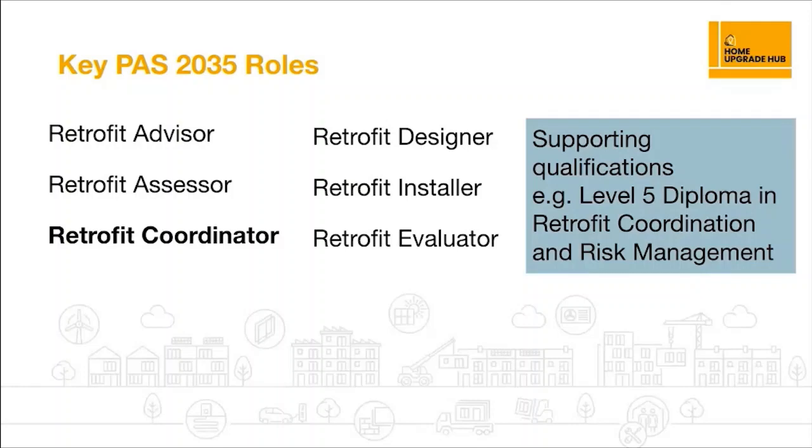And traditional building we might have in our minds as quite a historic property, but actually a traditional building could just purely be a pre-World War II solid wall home. So make sure that you're building those requirements into your procurement processes. And your retrofit designers, importantly, are probably also going to need to evidence certain professional memberships. So for example, if you've got architects, then they'll probably need to be showing proof of their ARB registration.